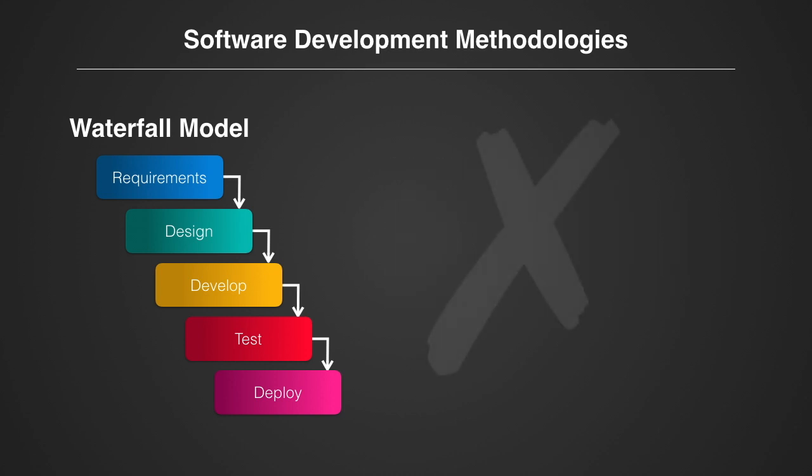However, despite its strengths for addressing political and legal requirements, the waterfall model is very weak for developing the actual product. This is because it suffers from difficulty to change plans that have been set. The heavy emphasis on thorough planning from the start of the project means that any changes are likely to break the plan. In the real world, unexpected changes are guaranteed in projects, and the longer a project takes to complete, the more changes are likely to occur.